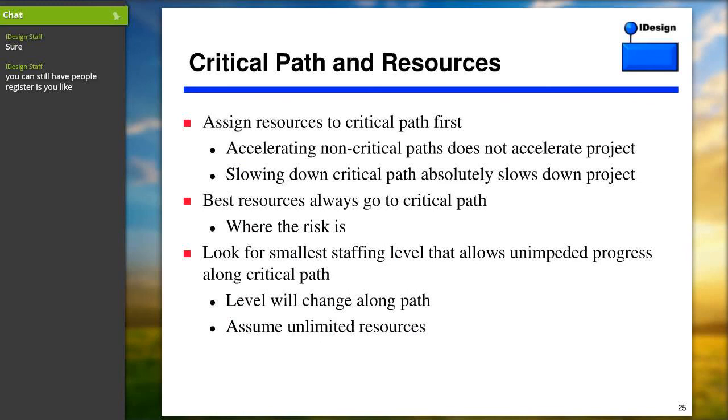Take it a step further. The best resources must always go to the critical path. That is where your risk is. It doesn't matter what the developers are good at, what they think they like to do. Best resources always go to the critical path.